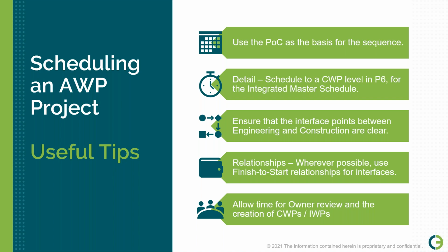Typically, if you're doing an EPC contract and it's all in-house in one organization, it's still important, but it's less critical. But typically, if you're having a handoff from engineering to construction, we need to know when engineering is going to be done with this. Relationships. For those of you familiar with scheduling terminology, wherever possible, use finish to start relationships for interfaces.